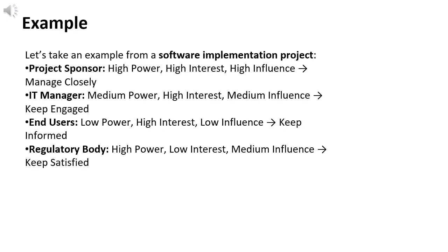Let's take an example from a software implementation project. Project sponsor: high power, high interest, high influence, manage closely. IT manager: medium power, high interest, medium influence, keep engaged. End users: low power, high interest, low influence, keep informed. Regulatory body: high power, low interest, medium influence, keep satisfied.